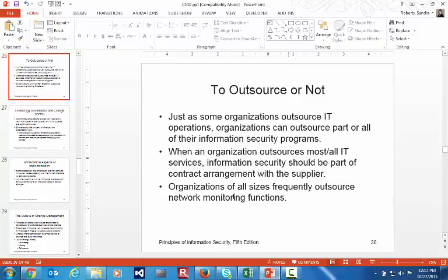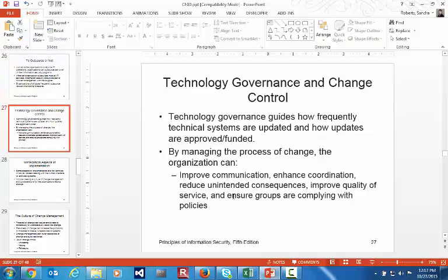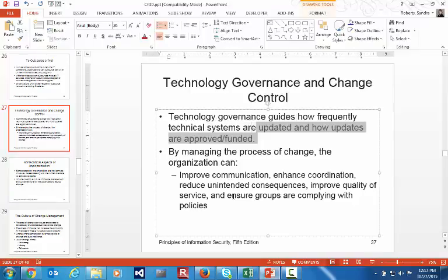So I always tell students that you do a contract for what you know the requirements are right now, and then if in 6 months those change, then that's a new contract. So there's a lot involved in that, to outsource or not. How quickly it just said exactly what I was trying to say.